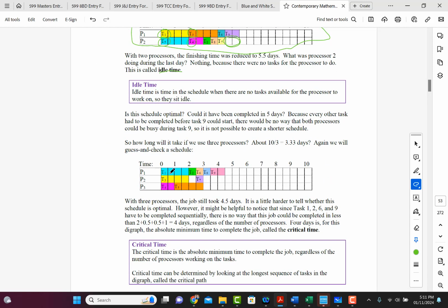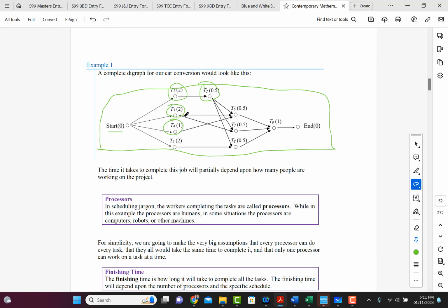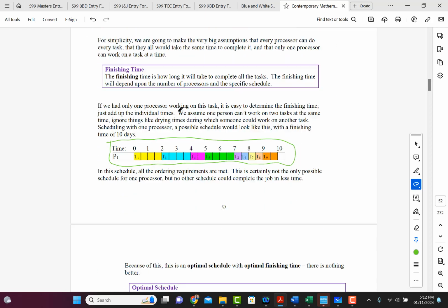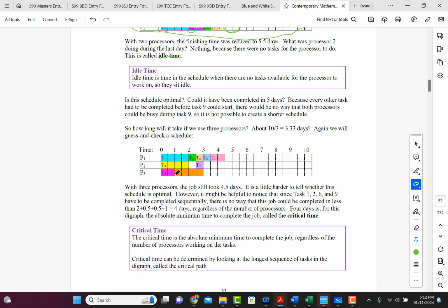Okay, notice how this is done, right? So now notice how task 1 and 3 take 2 days, right? And then task 4 takes 1 day, but then after task 1 is done, he starts task 5, which also takes 2 days. So task 1 and 3 will get done. Task 4 will get done a day early. Right here. So then task 5 will take 2 days, right?